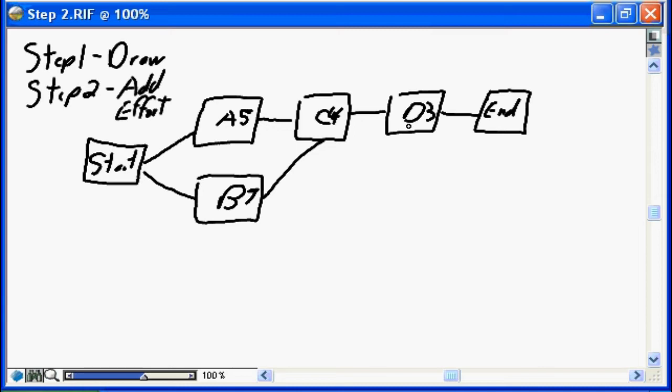Now, having been through the majority of this nugget series, I know you will appreciate that some of those conditions I have stated for drawing this simplistic network diagram to demonstrate the principles of network diagramming are not realistic. No one is ever available 100% of their time to work on projects. We need to make allowances for sick, for vacation, for unavailability.